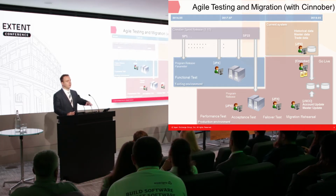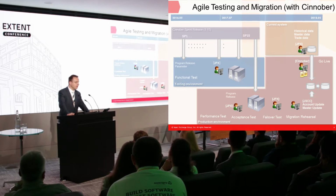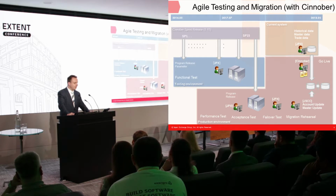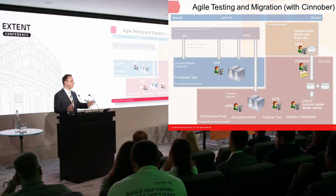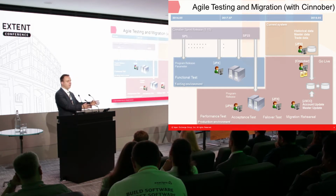If you look at how bugs get fixed in the waterfall method, and if you look at how bugs get fixed in the Agile method, you have this huge kink in the number of bugs being resolved rather at the end of the process, and this causes some raised eyebrows over at the regulator. So this is one of our dilemmas which we have to overcome, where we have to do some educational work. Also, the Agile method is very iterative, so we develop something, then we test it, then we develop the next thing, then we test it.